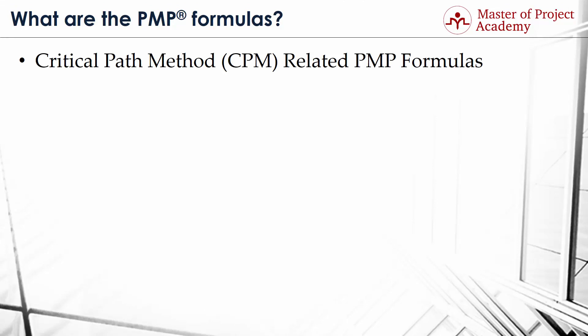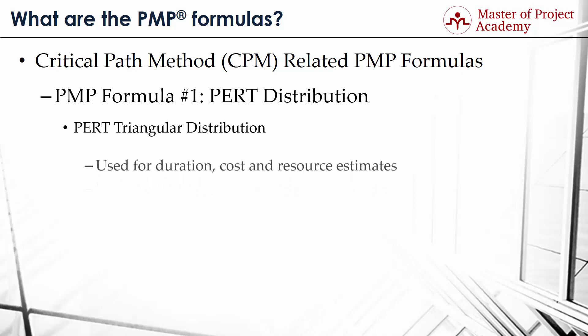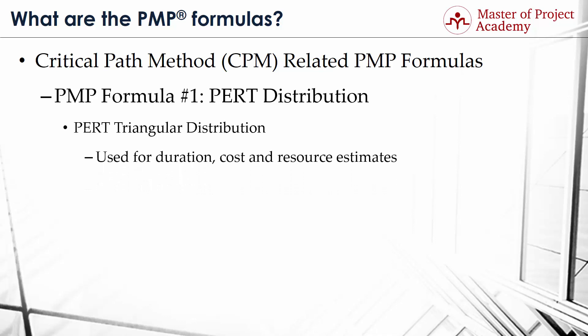The first set of PMP formulas are related to the Critical Path Method. PMP formula number one: PERT Distribution. There are two types of PERT distribution — triangular and beta. The PERT Triangular Distribution is one of the most important PMP formulas, and we use it to calculate duration, cost, and resource estimates. To calculate Estimated Activity Duration or EAD, you need to determine the activity Optimistic (O), Most Likely (M), and Pessimistic (P) estimates first.